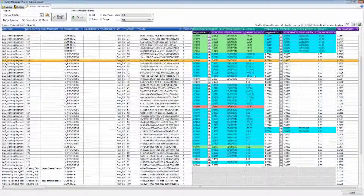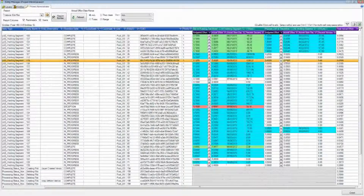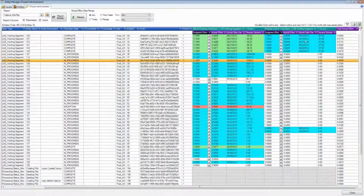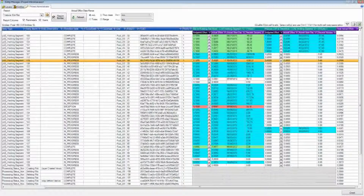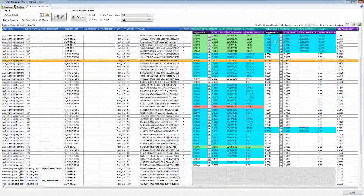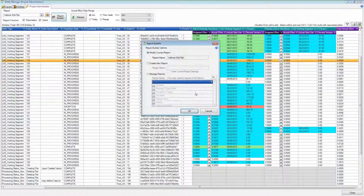You can see it's pulled that particular entity for all of the effort, the start date, and the variance — which is the percent difference between budgeted effort and actual effort — for each individual step. A lot of times that's fine, and that was something we could pull before, though not quite as easily. We can also roll up across multiple steps to get a combined effort for all those steps together. But the other thing we can do is go back into Report Builder and add in users.